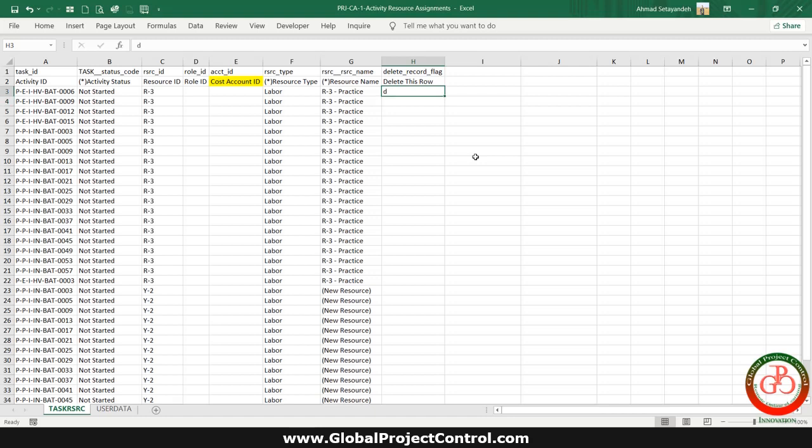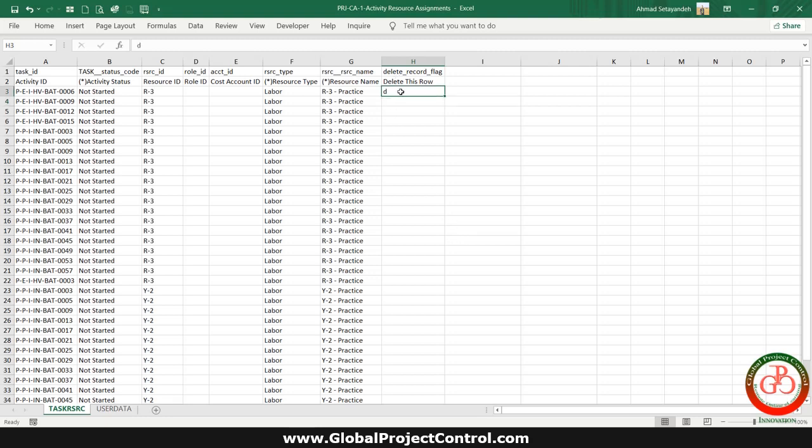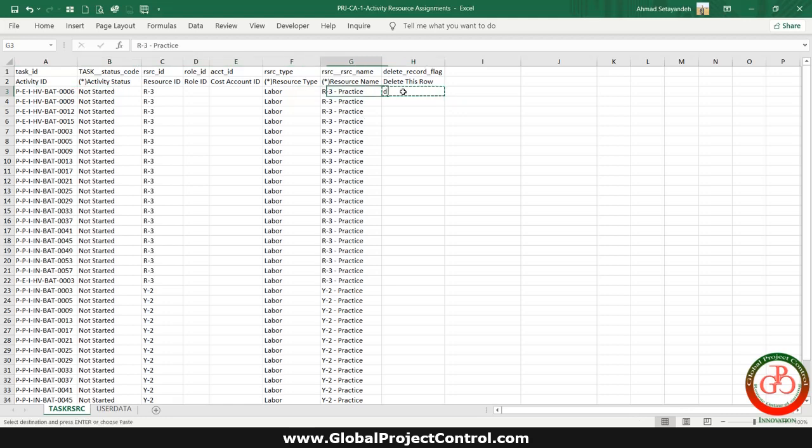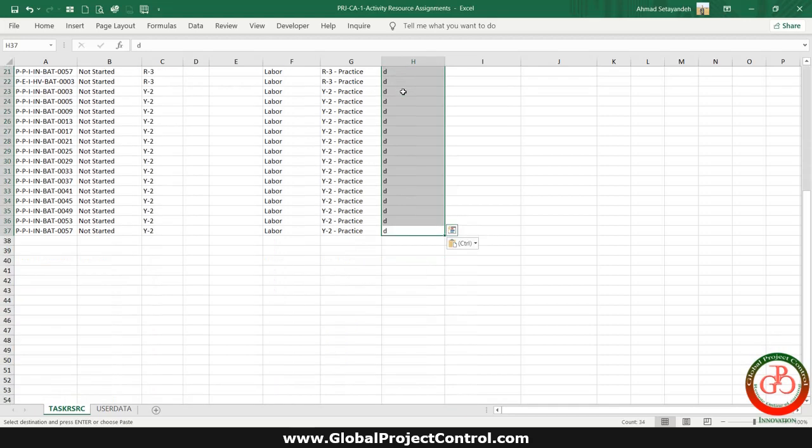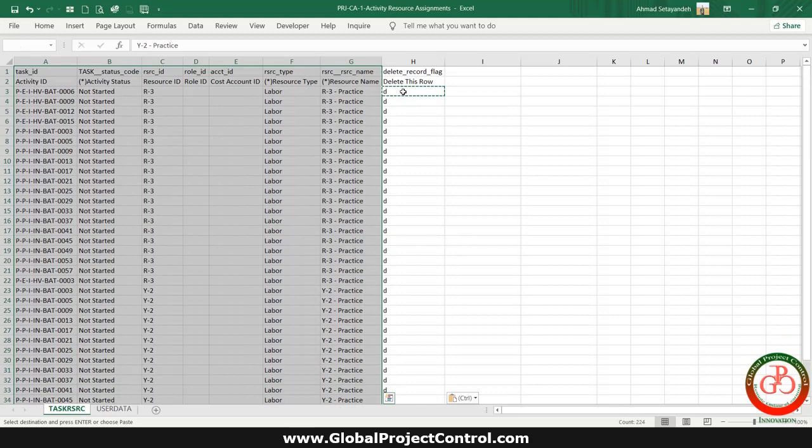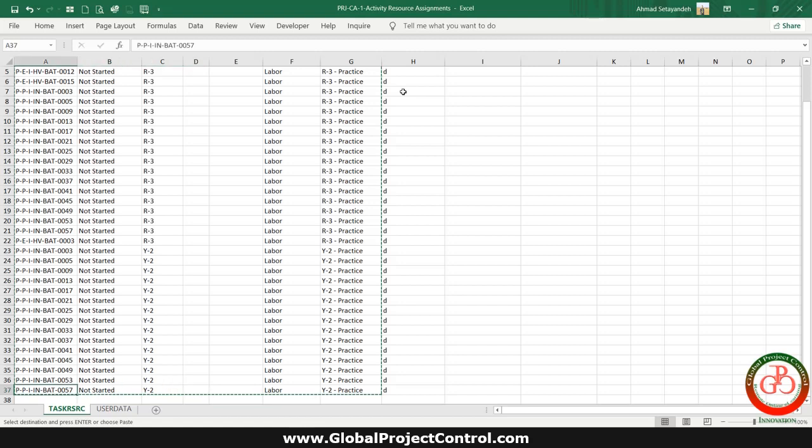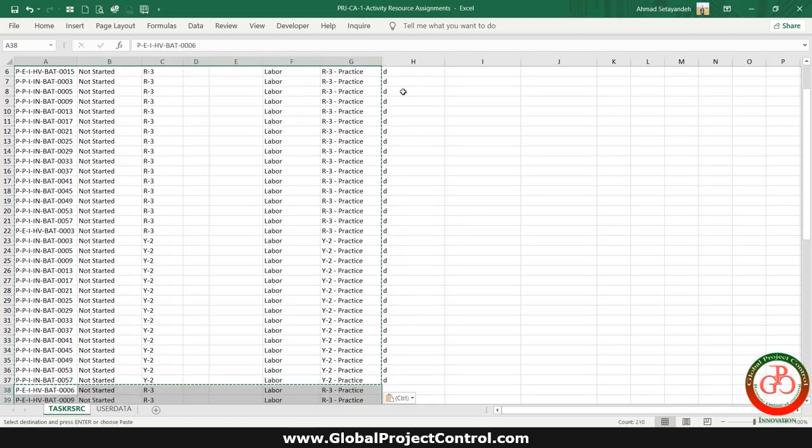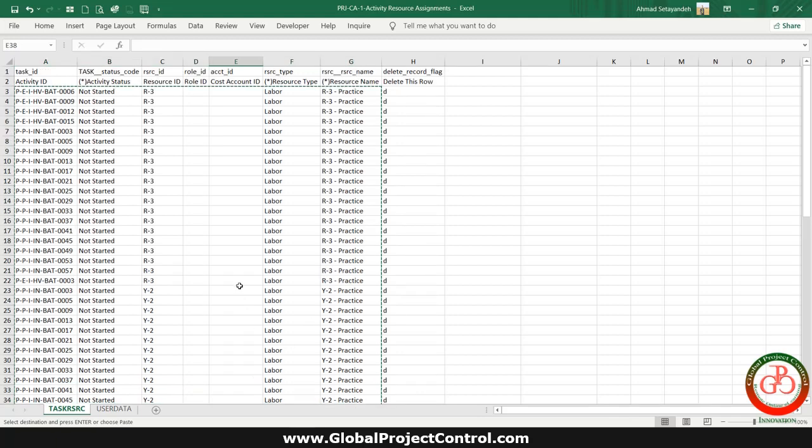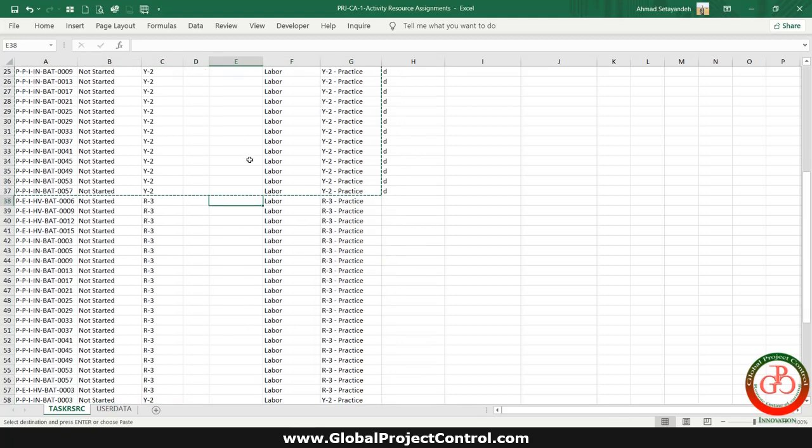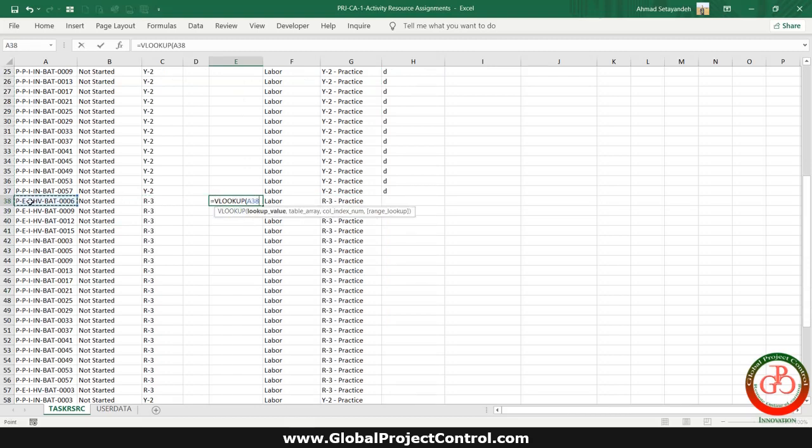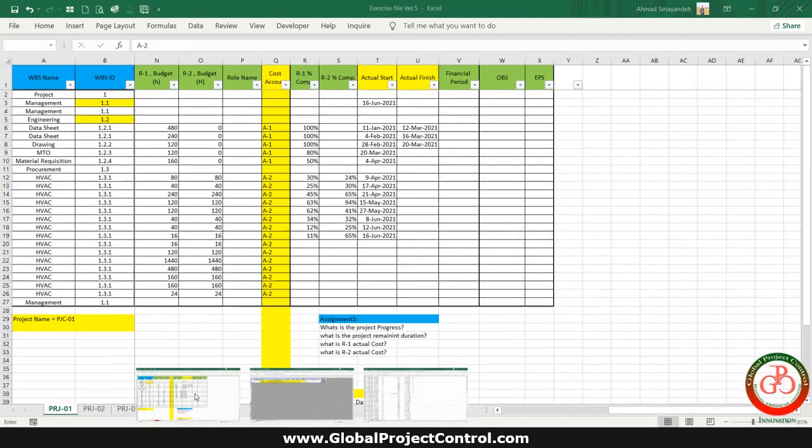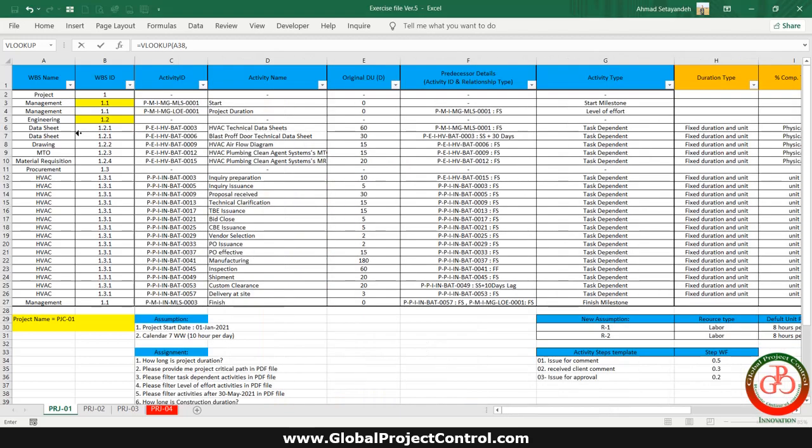Then during the import, this record will be deleted from my assignment in the project. So if you want to use the D character, you should use it and as a result of this, this record will be deleted. For assigning the cost account, you need to first remove all the available resources from your database. But fortunately, the assignments for the cost account are the same. So you need to add the same to your database. You need to follow your cost account by the VLOOKUP and search by activity ID. Then call the cost account from second table to this table.